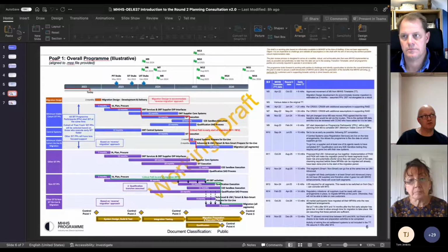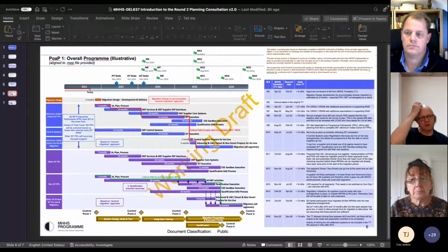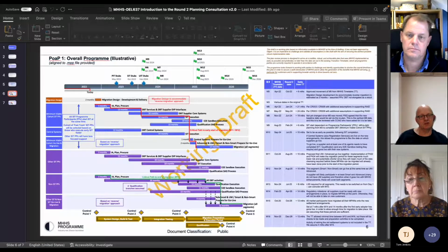So we don't want to rush to a plan where there's not enough clarity, but on the other hand, we have to baseline a plan that will have assumptions in it which are not necessarily ones we can dispel at that stage. So it's a balance of certainty and risk that we'll have to judge through program governance, and ultimately I guess the program steering group will take a view on whether it's a plan we can recommend to Ofgem or not.